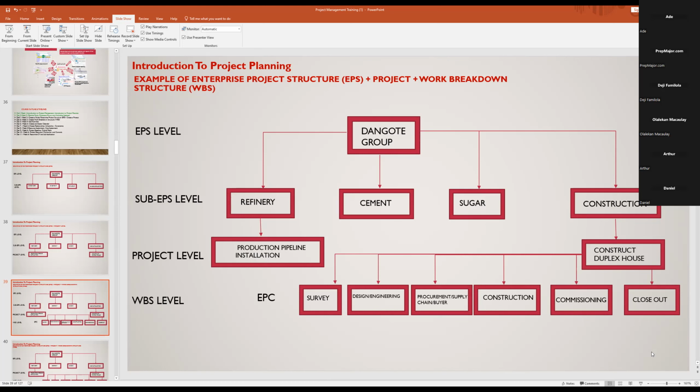So let's say we got a contract worth £1,000, and we've looked at it, our profit will be £400. So we know our cost to completion will be £600. So based on the £600, we say, okay, we're going to do this for 6 days, and that will cost us £600.